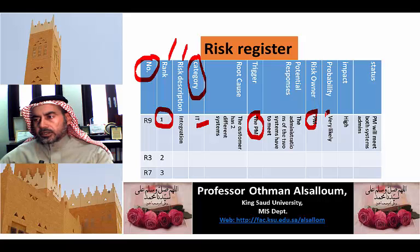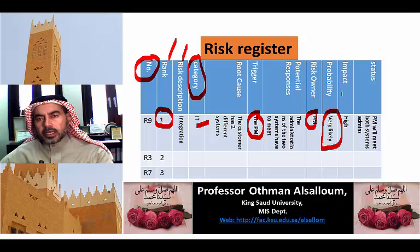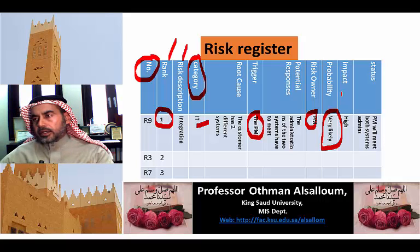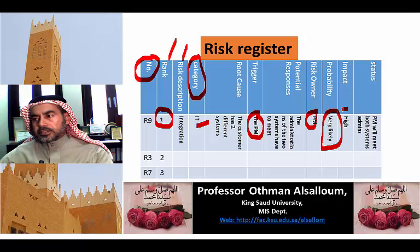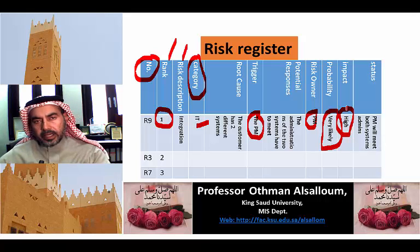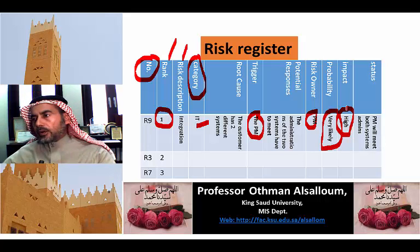We also assess whether it is high probability, very high probability, or unlikely, and put this in the Risk Register spreadsheet. We also assess the impact on our project — whether it is very high impact, high, medium, or low.